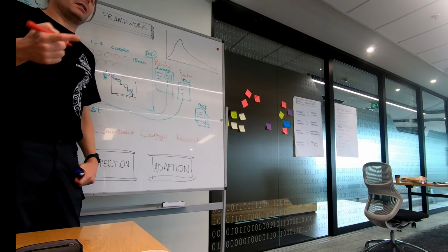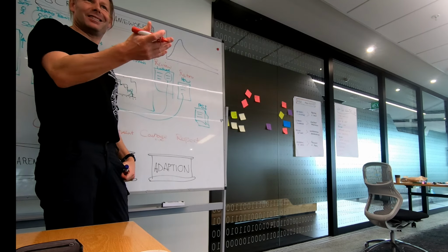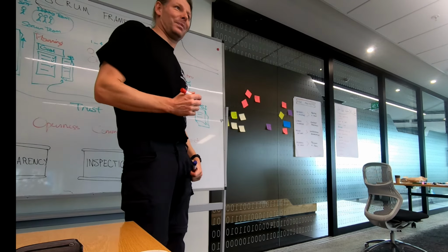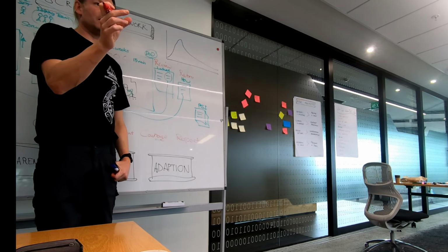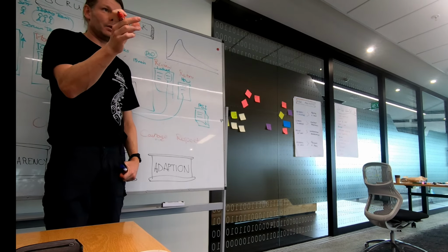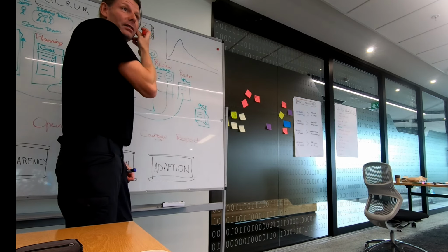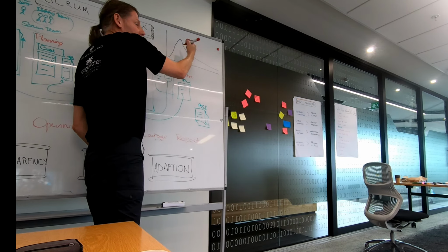Then what happens is the developer looks at my Gantt chart and says, oh, I don't need to start that for 2 weeks. And it's only 2 days worth of work, even though I've put it on a week. And then Murphy hits, Murphy's Law, and it takes a bit longer. So even though I said it's going to take 3 weeks, it takes 3 weeks and 2 days. See what happens? And the reason is this, the Gaussian curve of estimation: things are unlikely to be shorter than we thought. They're likely to be longer.